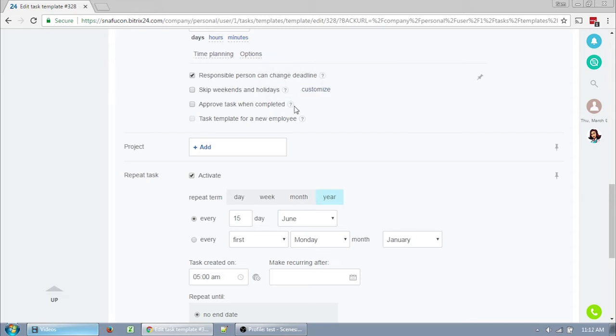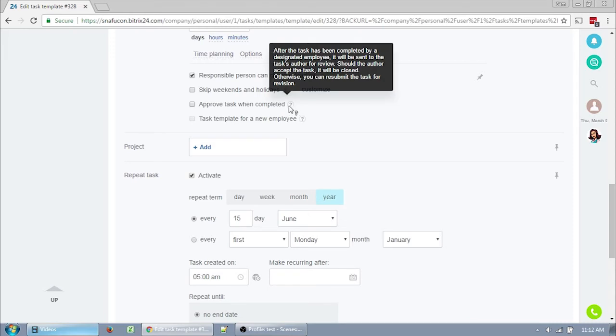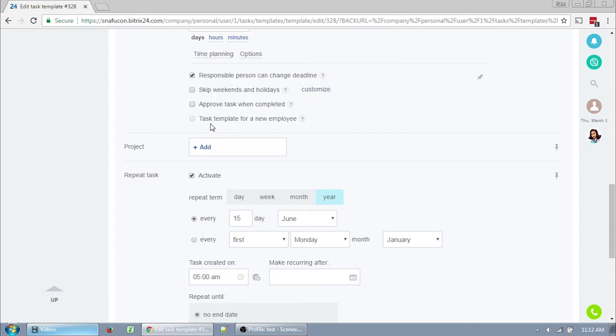Approved task when completed is best used for tasks that you need to review before completion. When the responsible person tries to finish a task, it's left open for the creator to review. Once you've reviewed it, you can either finish it or kick it back to them to complete. I rarely use this feature, but it would work best for anything that takes a lot of review to complete, such as graphics or letter writing, or something that the user is currently in training for.